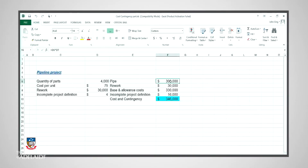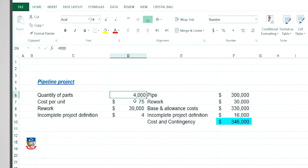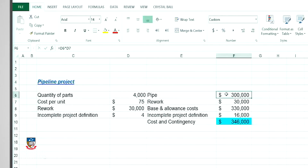As an example, I am attempting to prepare a cost estimate for a simple pipeline project. Using the spreadsheet, I include the number of pipes that I need, which is, for the purpose of this illustration, 4,000 bits of pipe. If I estimate the cost per pipe to be $75, then I can determine the cost estimate for the total pipes, which is $300,000.